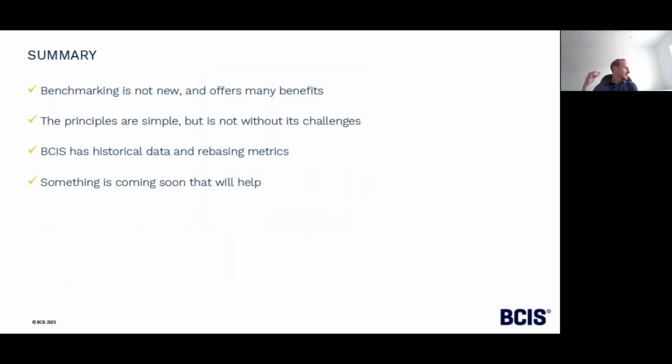Well, we mentioned optimism bias earlier when you were talking about your age. So the human nature, I guess, optimism bias. What is it? It's all about being optimistic about where the costs are going to land on a project. Ultimately, the people who are using optimism bias feel that the cost is going to fall somewhere probably below the average cost. And what that does is probably underestimate the cost of a project. It probably underestimates the risks of a project, but it probably overstates the benefits of a project.